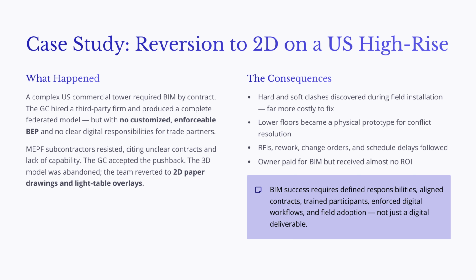There was no customized and enforceable BEP. The digital responsibilities of the trade partners were not clearly defined. The contracts did not explain who had to model what, how the models would be used, or how trade partners were expected to participate in digital coordination.